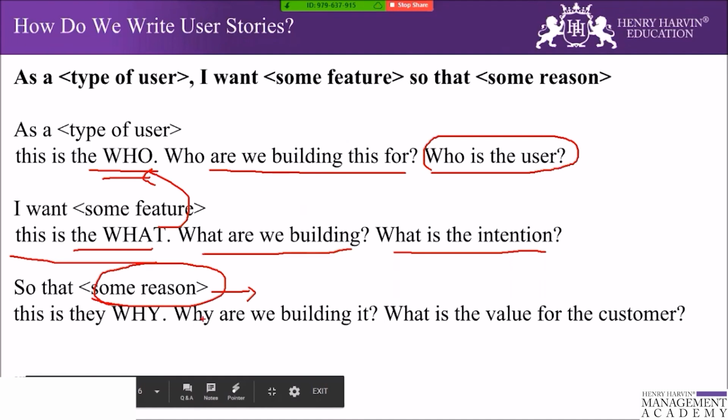I understand that there are a few requirements that can be written that way. For example, a technical backlog can be written in terms of a user story as well, where the team can be described. Because when the team describes their own technical backlog, the who will change. So for example: as a development team member, we want this performance to be in this way, so that our system should not shut down when there is more than the expected load on the system.